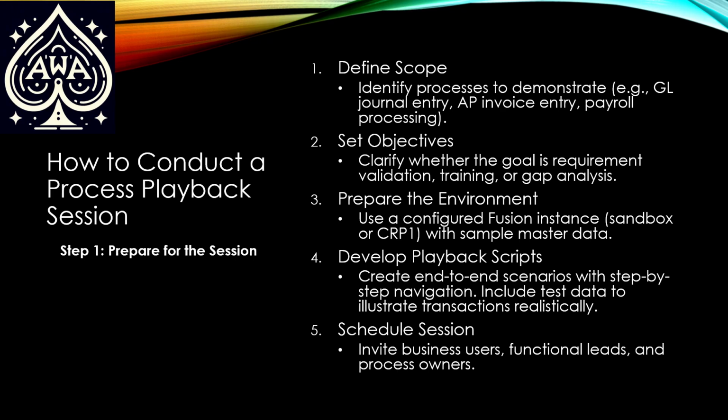Now, you'd also have to have playback scripts. These playback scripts will show exactly what you need to do in the instance, but more importantly, it shows what the client needs to do in the instance to make sure that they can get through these processes correctly. Too many times I've seen people do, I'm entering AP invoices for a payables session. Okay, I'm going to put the invoice number in, I'm going to put the supplier name in. I'm not going to put a description for the invoice. I'm going to come down to lines, put my accounting in, again no description if I'm just keying it in, and hit submit. Well, that's great, but that's what the client saw, so that's what the client's going to do.